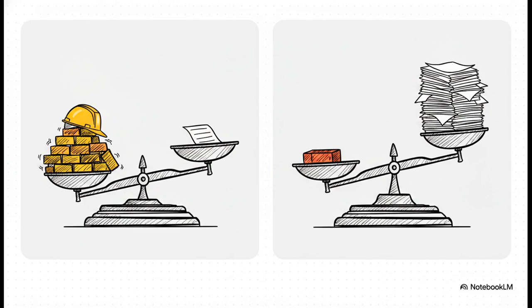On the flip side of the scale is overbilling. This is when you've invoiced ahead of the actual physical work completed on site. Because you now effectively owe the client that physical labor, overbilling tips the scale straight into a liability.